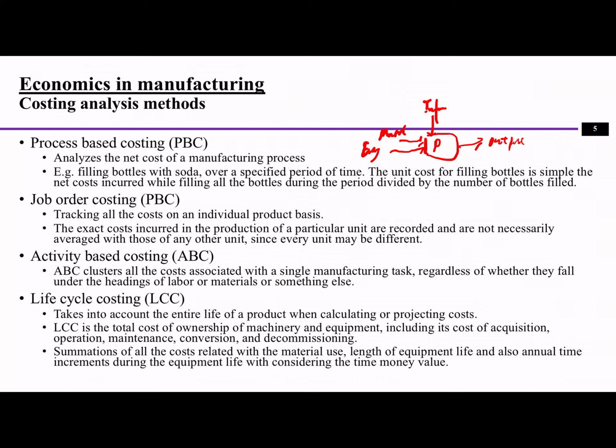In life cycle costing, a lot of times we have to use engineering economics that we learned in the past in calculating the cost over the life cycle, because for equipment it can be 5 or 10 years, or even longer, right? For a project maybe there are a lot of years. So that's why the interest rate and time value of money play an important role in life cycle costing. But make sure to account for all the cost items along the life cycle, right?